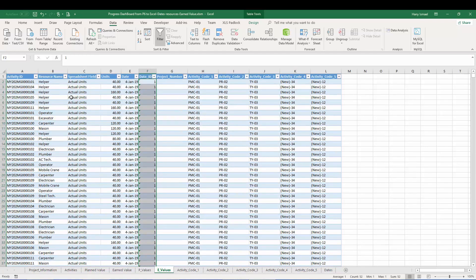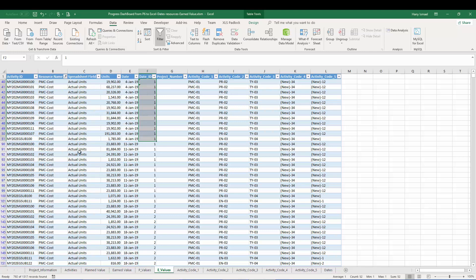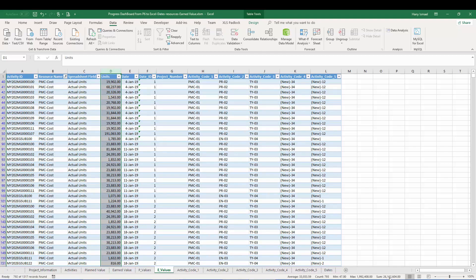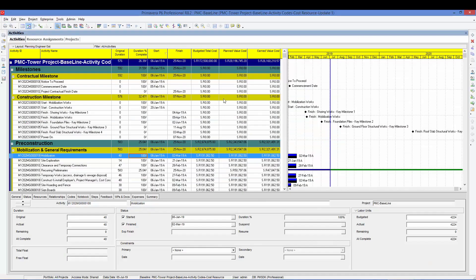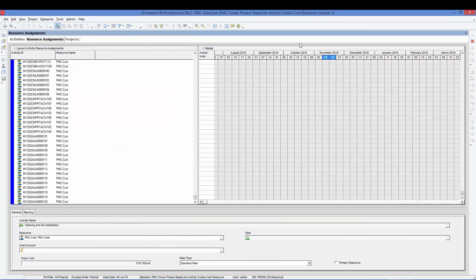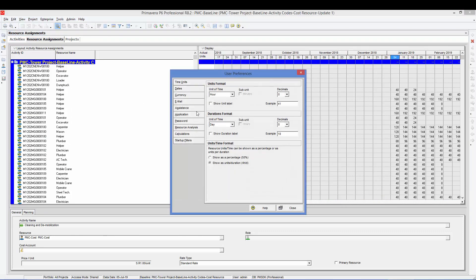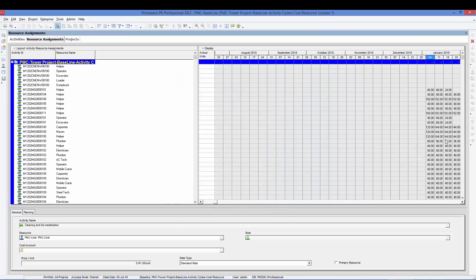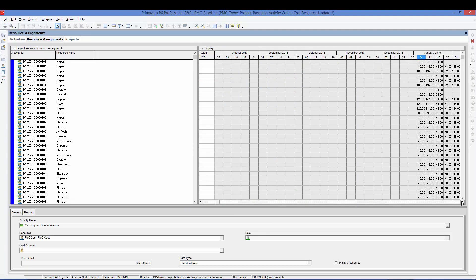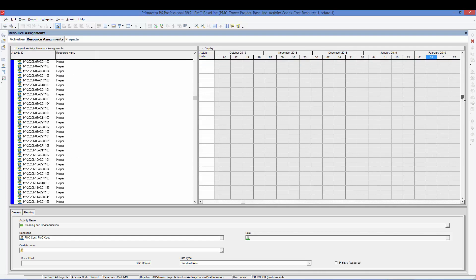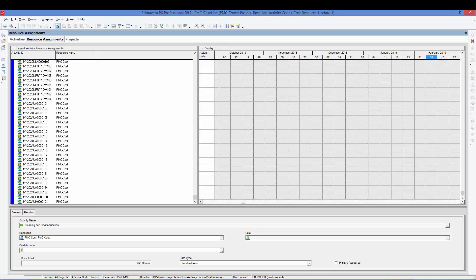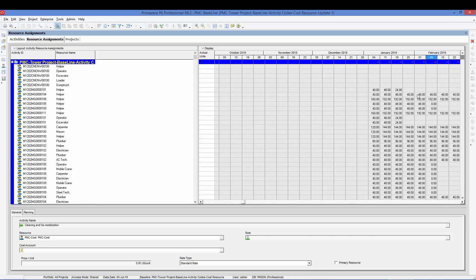So from here, I will check the cost. Here is the PMC cost. And I will check the units. It is 26 million 162. Here in Primavera 26 million 160. So there is 2000 differences. No problem. So here if you want to eliminate these differences, we can show the decimals here. So from edit user preferences, time unit, I'm going to choose two decimals. This should make the calculation accurate because here, if we are not considering the decimals and there is decimals in the formula or in the calculation, this will affect the total. So by showing this decimals, you might reduce the variances between the Primavera calculation and the Excel calculation.